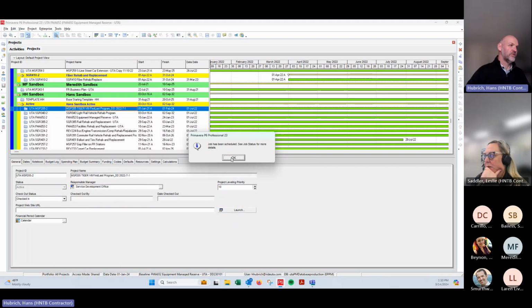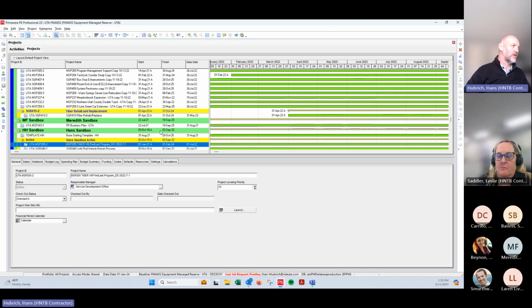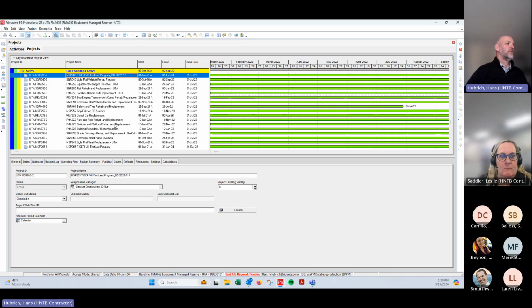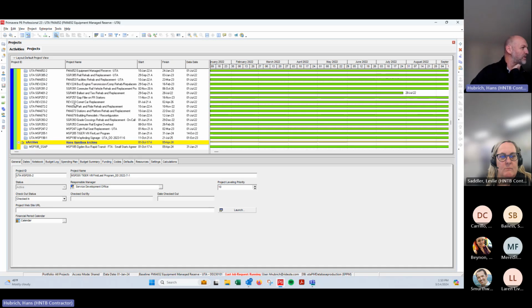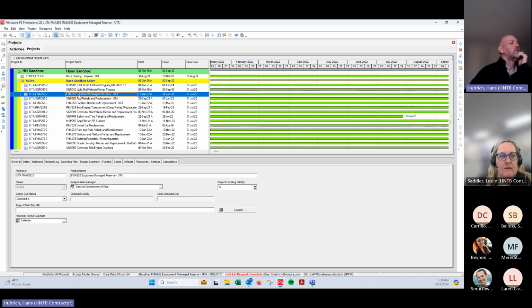And the reason we do that is if while you're updating, you make some kind of mistake and you're like, oh, I don't know how to undo that. You can just come down here, grab your sandbox project that you just saved. In this instance, I think it's probably this one right here, my FMA 652.